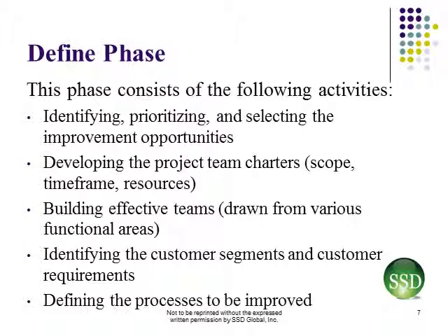So you generally start the Define phase with a process map. And this is a high-level process map, and you end the Define phase with the project charter, which is basically permission to move forward. In the DMAIC, a project charter is more like a proposal, because we know the problem, we simply don't know the solution. So whereas a general project charter would be showing you definitively a work breakdown structure of what your project's going to do, etc., etc., in the Define phase of the DMAIC model, I'm basically trying to get you to give me permission to move to the next phase.